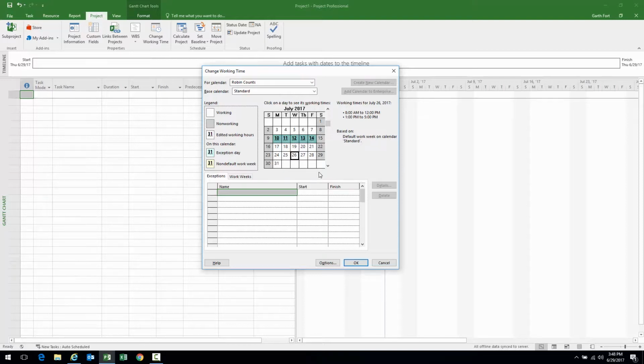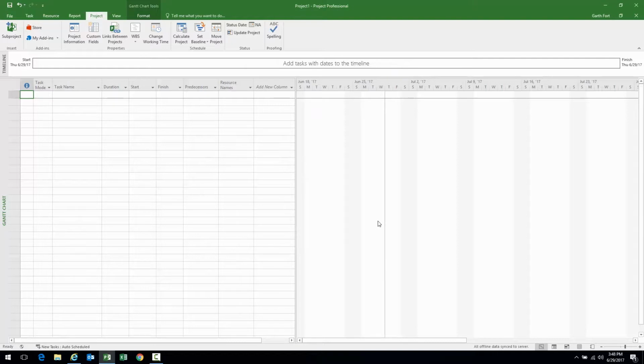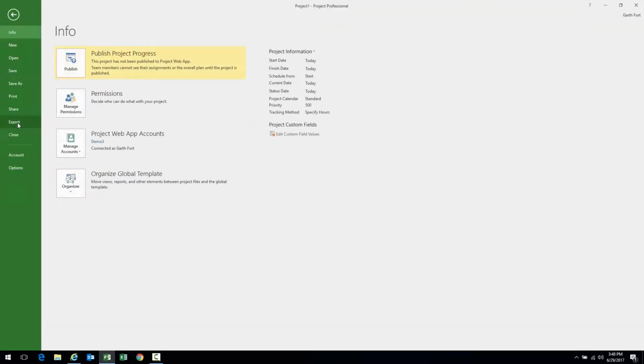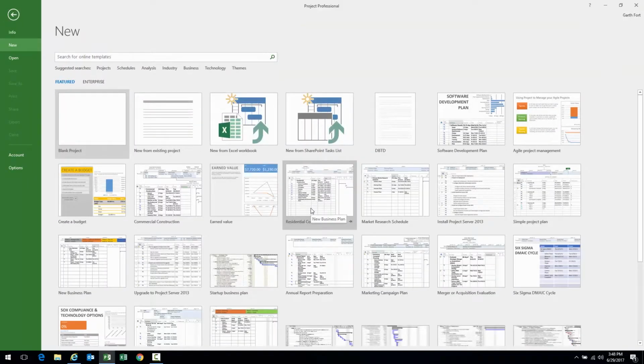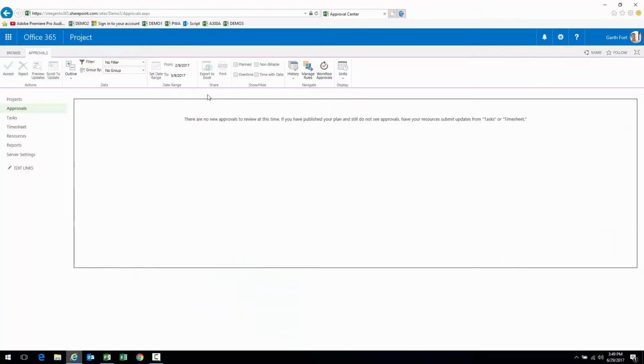That is the one that is initiated by your team member if your organization happens to be using timesheets. In this particular case, let's say that you want to utilize another method. Okay, you're not using timesheets, or your particular organization isn't allowing team members to submit updates for administrative or operational activities. Okay, the other way to do that would be initiated via the Resource Center within the tool set. So I navigate to Project Online, navigate to the Resource Center.